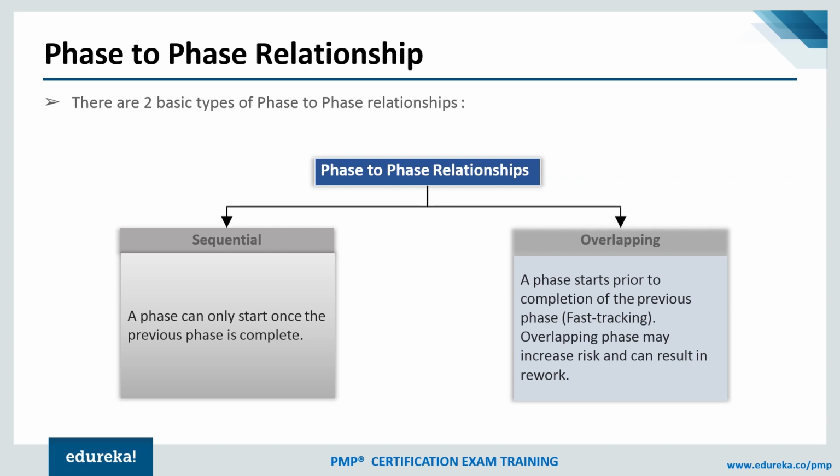So this may result in faster development, but at the same time, it is definitely going to increase the likelihood of rework. During the last stage of requirement gathering, a new requirement may come up. You have collected 75% of the requirement, and for the remaining 25% you need to meet some of the stakeholders to get their requirements.